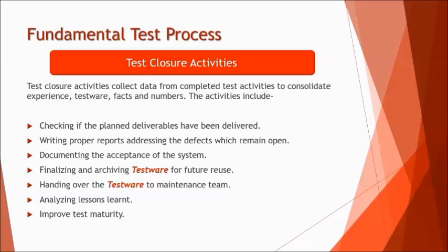So putting it together, like the reports which we're supposed to write as a part of this process, have you written them? There are certain things which remain open. For example, a few of the defects which are marked deferred by the developer, that means these defects will be fixed at a later point of time, maybe in upcoming versions. Then we must prepare the proper reports addressing those defects, which version you are targeting to cover and fix them. So this will also be a part of test closure activities.